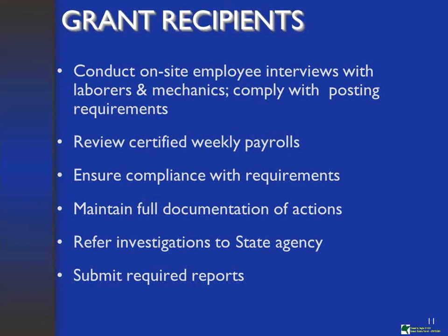Review the certified payroll reports. Now, bullet number 1 and bullet number 2 basically go together. For example, you may receive certified payroll reports, and the bullet related to the employee interviews, that's a reconciliation point. So you receive certified payroll reports and somebody conducted employee interviews. Theoretically, the information collected in the field should reconcile with what the contractor is reporting.